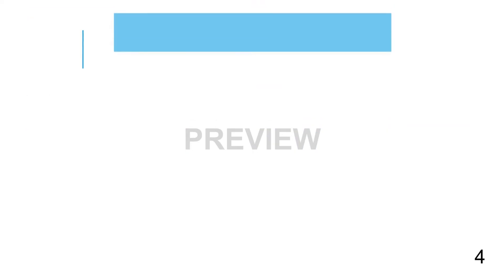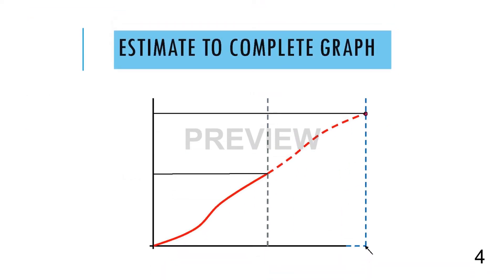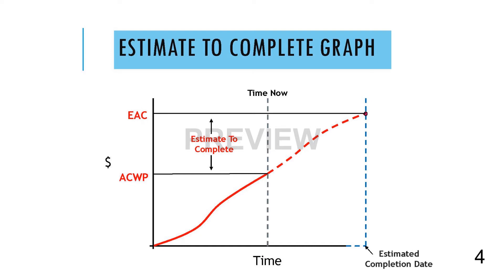This graph demonstrates the relationship between the actual costs on a project and the estimate at completion. The difference between these two data elements is the Estimate to Complete, or ETC. The forecasted time span associated with the ETC is the same as the estimated completion date, which matches the schedule's forecasted completion date for the project.